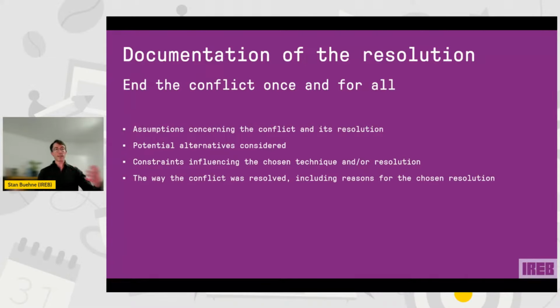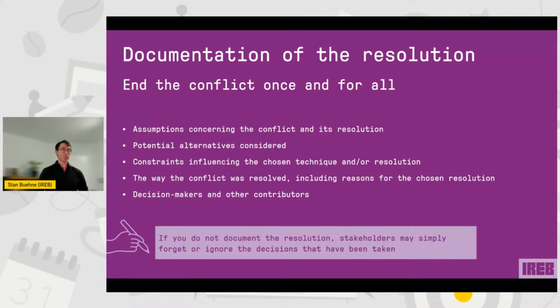And I think here it's super important to also document what was really the reason why the solution has been chosen. Finally, the decision makers or contributors to the solution or to the selection, because if you have documented this, you can at least go back and talk to these people, and then maybe they can support you with coming back to this proper solution.